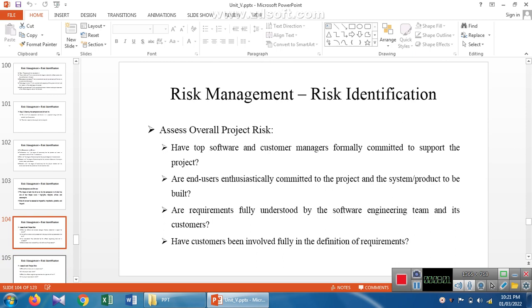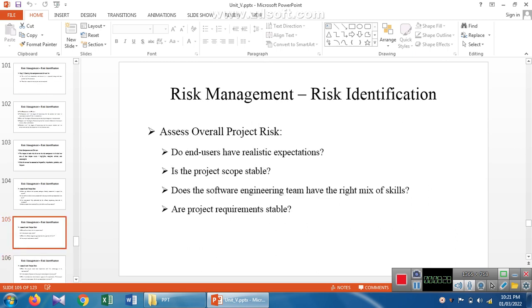The overall risk checklist for project risk includes: has the customer been identified, are managers formally committed to support the project, are all end users committed to the project, and are all requirements identified and understood by the customer as well as the software developer. Additionally, are end users having realistic expectations, is the project scope stable, does the software engineering team have the right mix of skills, and are project requirements stable? If any deviation, mistake, or uncertainty is identified in software development, we move immediately to correct that risk in the software product. This correction process is also called risk management.